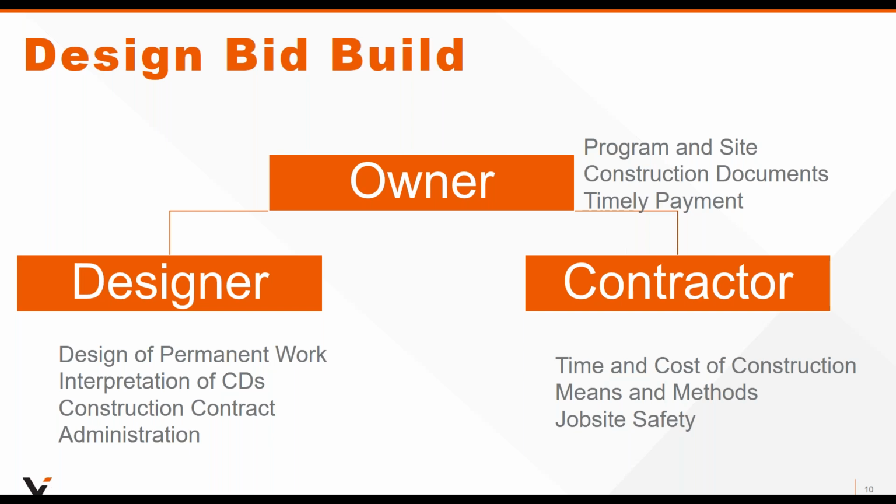And a year after the work had been completed, a dam and a connecting sewer that had not been identified or was known about failed, and it caused flooding in the area excavated for the dry dock. The government subsequently filed suit, claiming that Spearman had failed to properly investigate site conditions. The contractor countered that he had relied upon the information provided to him by the government, and it did not show the existence of the dam, and it was reasonable for him to rely on these documents.